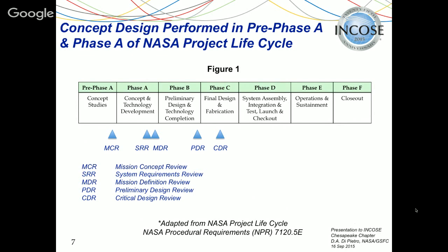It's a very important one, and so the degree to which you can estimate mass for aircraft, for example, is very important to the success of whether a program will succeed in phase B and C. If you come in light in phase A and you allow that to go forward, you can have major weight increases in phase B that cause significant redesigns.